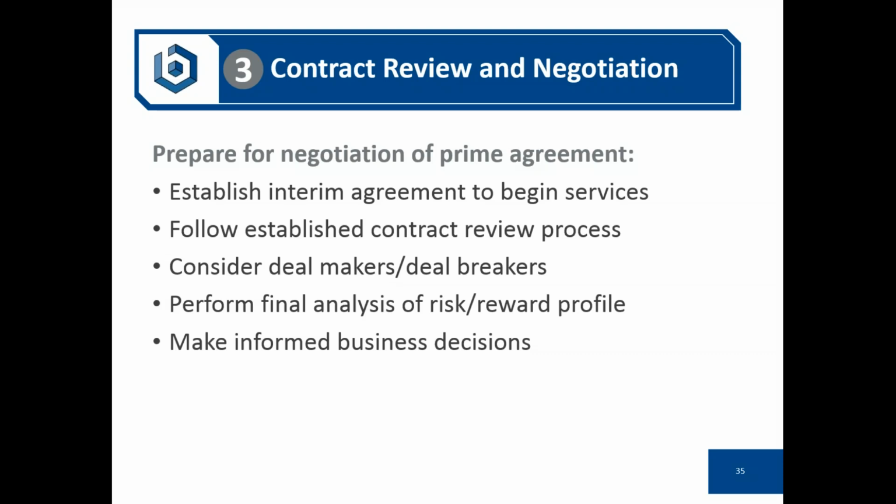A deal maker example would be a limitation of liability equal to your fee. And again, if you never ask for it, you'll never get it. Your fee or reasonable multiplier of your fee, we think it's particularly critical for limited scope projects where you don't want to expose your entire deductible and your entire policy to a very limited service. Ultimately, you're going to perform an analysis of the risk-reward profile of the project and the contract and make informed business decisions.